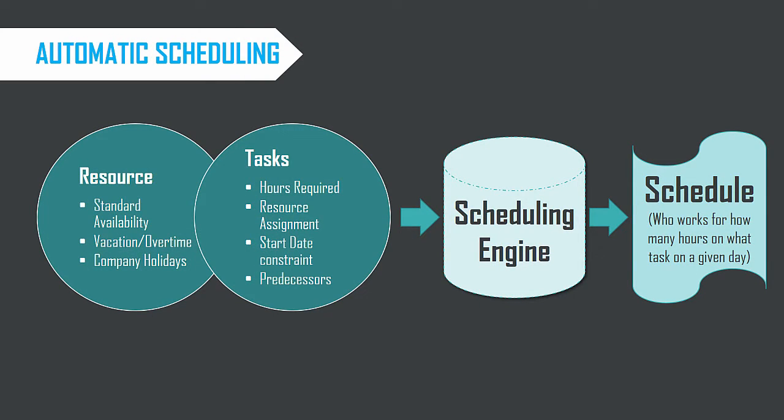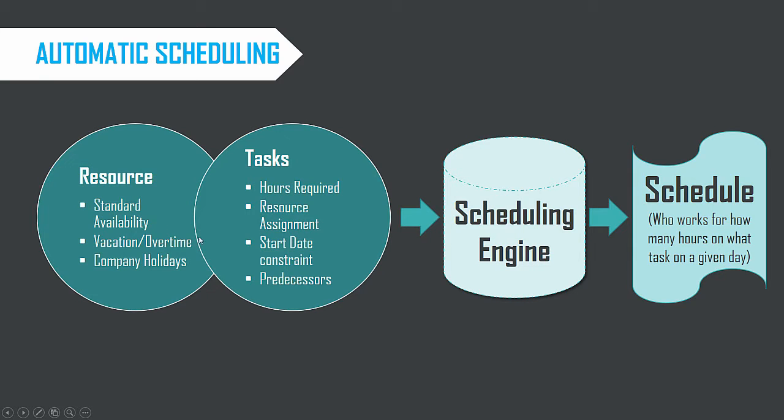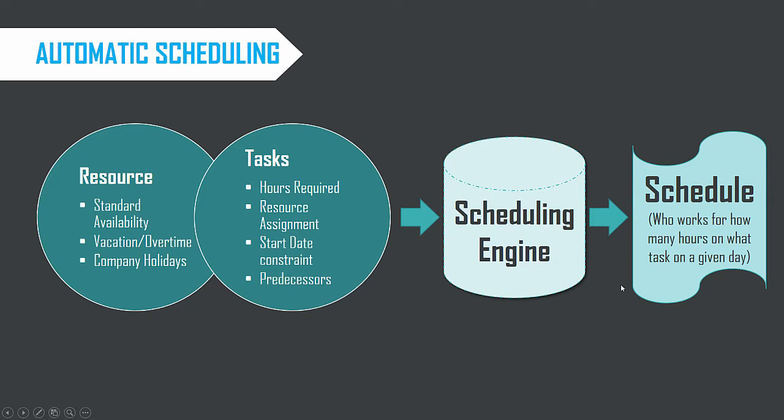It takes as input the resource availability, vacation, overtime, company holidays, and also details about the task. The list of tasks, the work that is required for each task, and which resource is going to work on which task. And then are there any external constraints on beginning of a task and also any predecessors. It takes into account these as input. And then it goes through our scheduling engine logic inside the template. And it will build out the schedule. Who works for how many hours on what task on a given day. And this acts as the foundation for all the calculations and reporting that is built into this template.